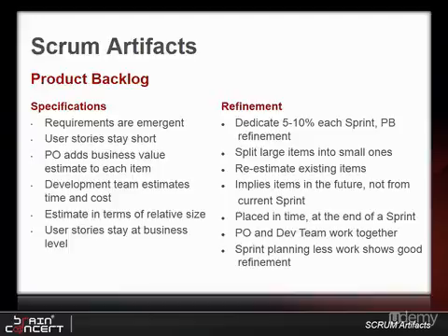Fourth, the development team is responsible for all estimates. The product owner may influence the development team by helping them understand and select trade-offs, but the people who will perform the work make the final estimate.